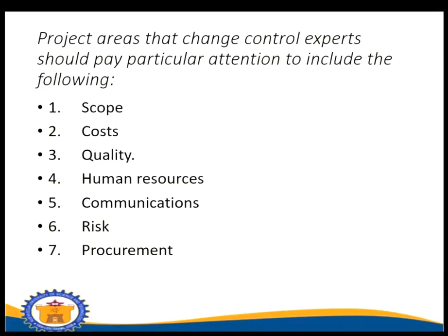Quality. Change requests must be evaluated to determine how they will affect the quality of the completed project. An acceleration of the project schedule, in particular, can affect quality, as defects can occur if work is rushed. Human resources.